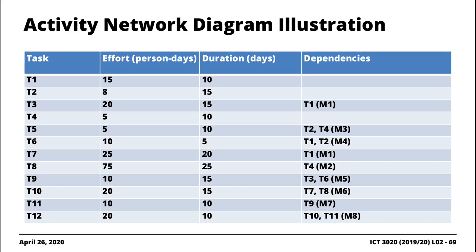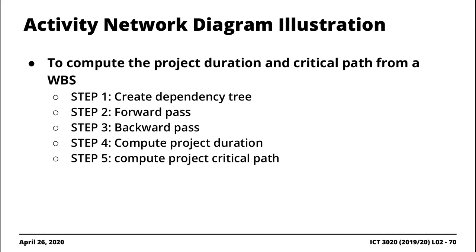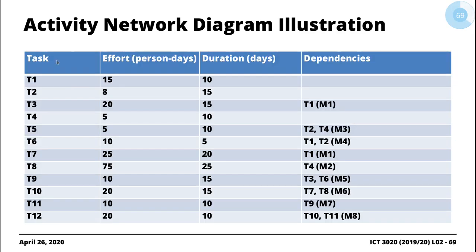The input for the activity network is typically the task IDs or task names, the associated durations, and the dependencies that exist amongst the tasks. This comes from the WBS or work breakdown structure — you come up with tasks, how long each task will take, and the potential dependencies associated with the different tasks. That's all you need. Using these three aspects, we can derive an activity network.